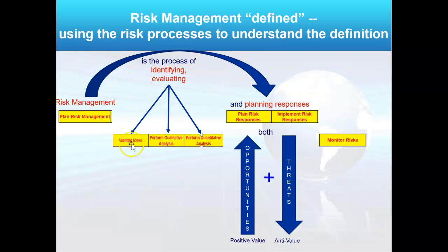And those are those processes two slides ago we just talked about. Identify risks, perform qualitative analysis to prioritize those risks identified, and then for a few, ask your company if they wanted to do quantitative analysis, a deeper study, more than you have time for. And then, of course, planning your responses, which means plan the actual risk response and implement the response if required,